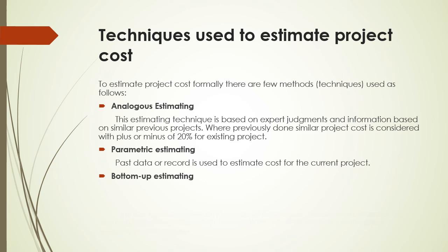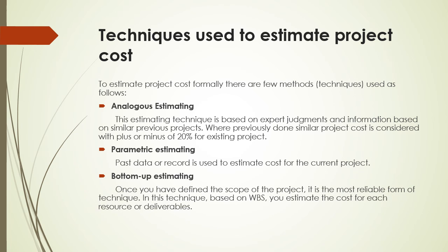Bottom-up estimating. Once you have defined the scope of the project, it is the most reliable form of technique. This technique is based on the WBS, where you estimate the cost for each resource of the deliverables.